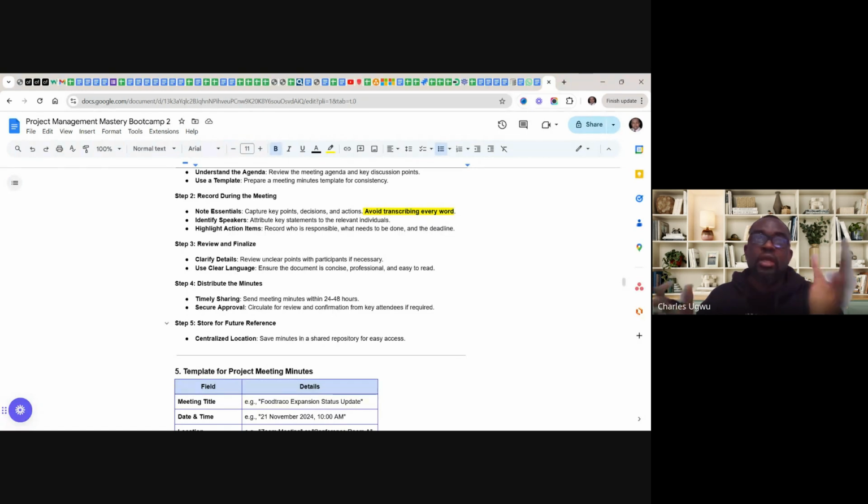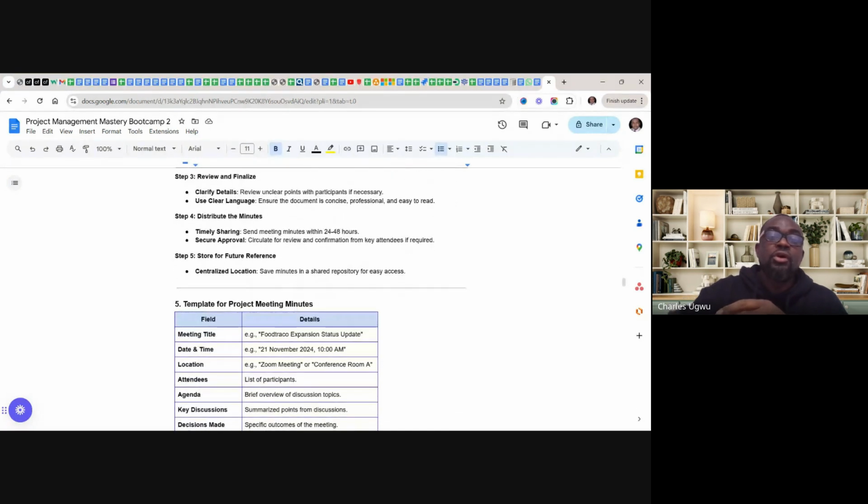You can send it back to their various emails for them to review, and they'll give you a thumbs up. Yes, we're happy. That is validation. You just documented the outcome of the meeting. So for it to be a working document, it must be approved and stored for future reference.